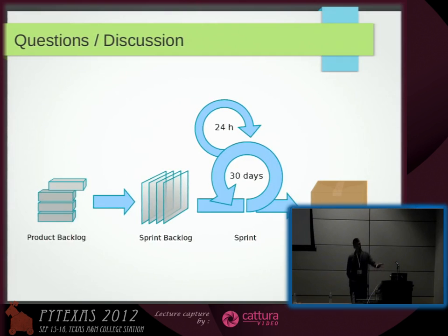One thing that this basic Scrum definition is not saying, but is almost being considered to be added to the process itself, is something called release planning. Initially, it could be part of that project before the project, but the sense is we want to identify all the features that we have to have in order to release something. That would answer the question: if we don't have all these features, we are not going to release it. The other part of that equation would be the definition of done.